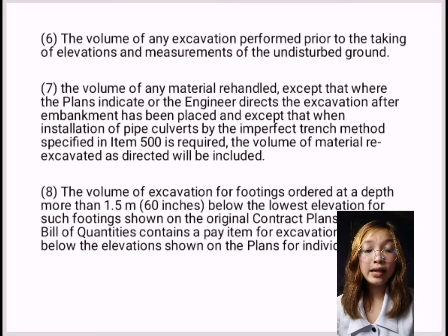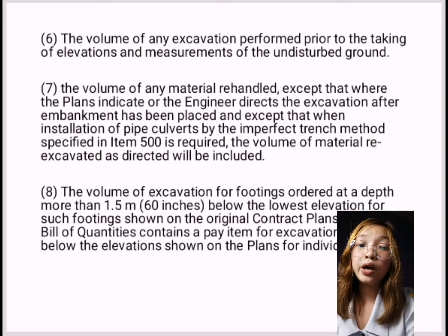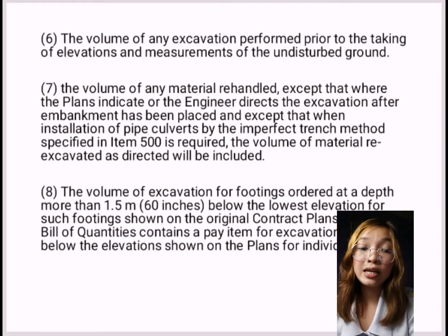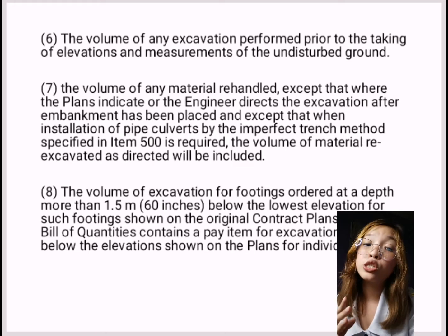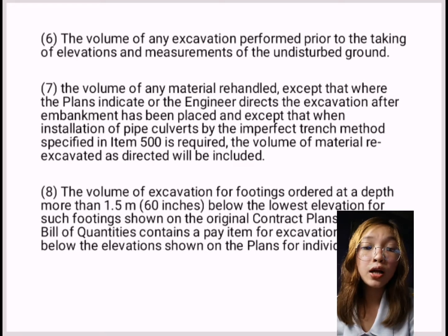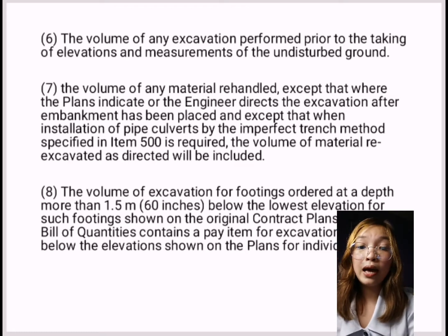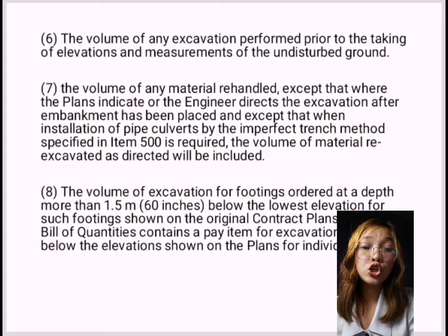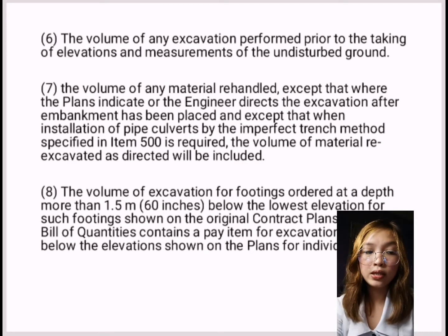And lastly, the volume of excavation for footings ordered at a depth more than 1.5 meter or 60 inches below the lowest elevation for such footing shown on the original contract plans, unless the bill of quantities contain a pay item for excavation ordered below the elevation shown on the plans for individual footings.